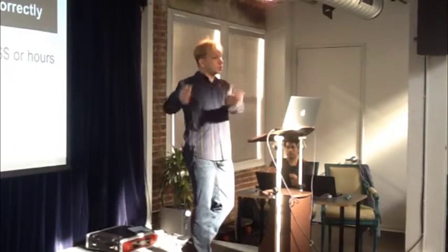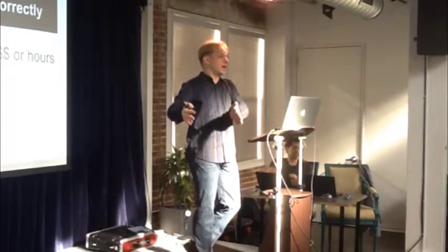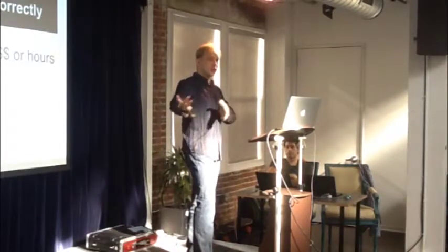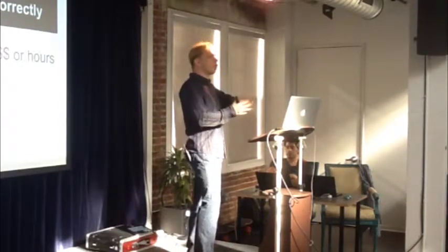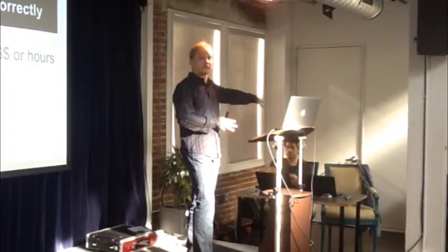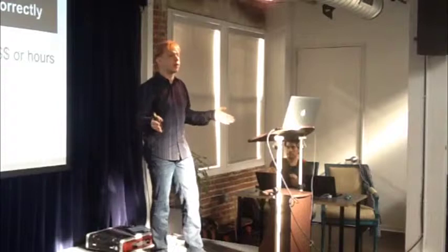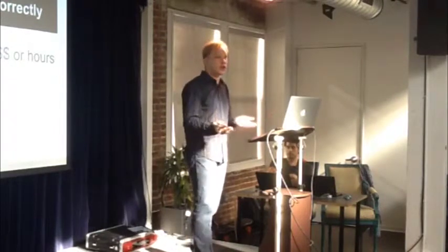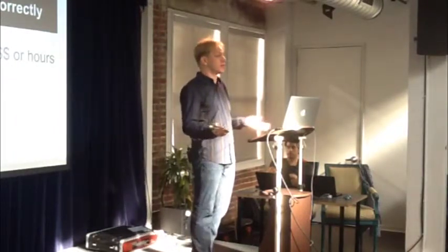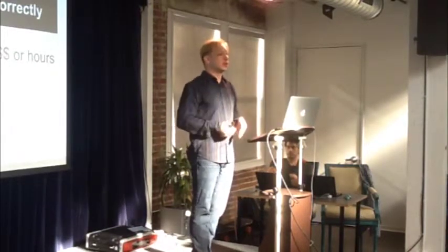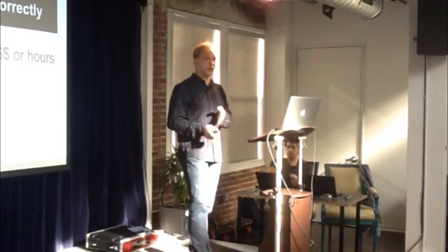The team leader of the project did that, and then she passed it off to me, and I did the math without second-guessing her points estimates. I did the math of what points had cost historically over the entire first year of the project. We multiplied those two values together. We told the client it was going to cost $17,500 to build this set of features. The end result when we finished them was $17,200. It was one of our most accurate estimates ever.